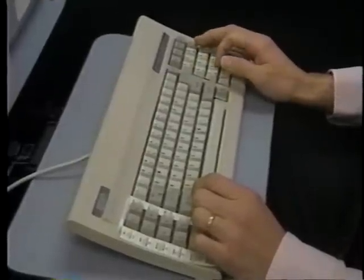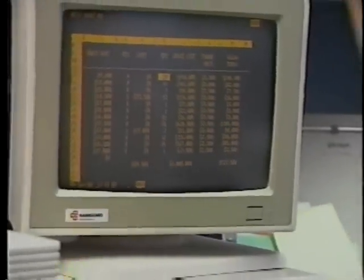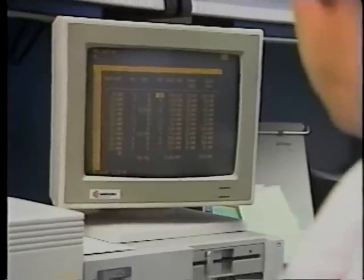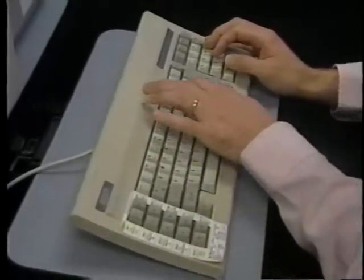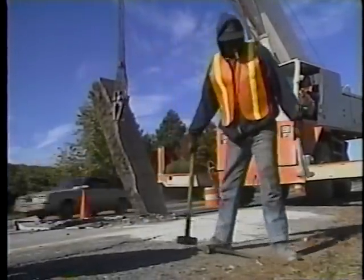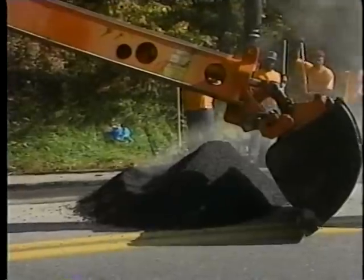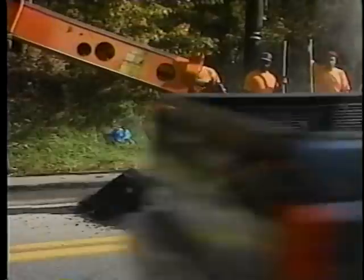With a work program in place, the next step is to prepare the performance budget. A budget is an estimate of the amount of money required to operate an organization for a period of time, usually one year. A performance budget is one based primarily on the cost of work to be done as defined by quality standards. Cost estimates are broken down by the object of expenditure — meaning labor, equipment, and material — or by activity.